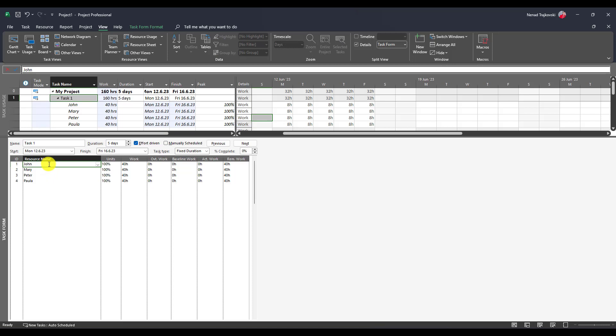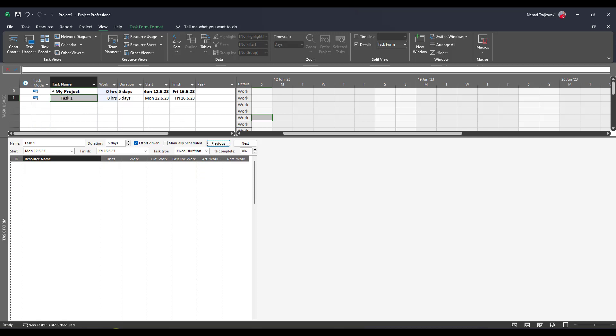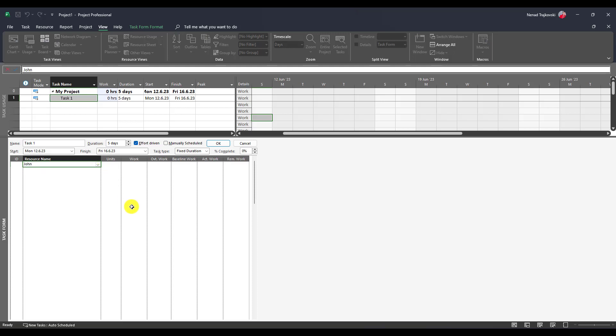Let me go back and remove all of them. Now let me add one by one. First, John. John should work on the fixed duration task and it's calculated: five days multiplied by 100 units equals five multiplied by eight, 40 hours.